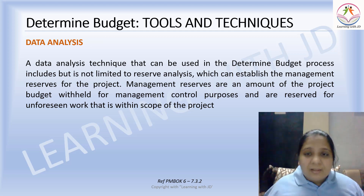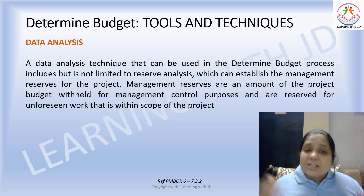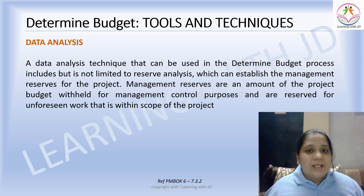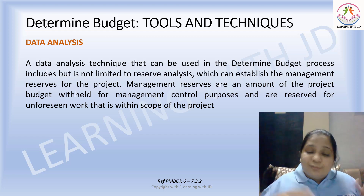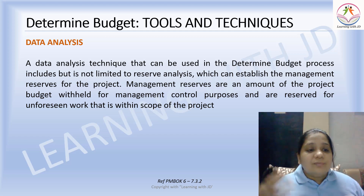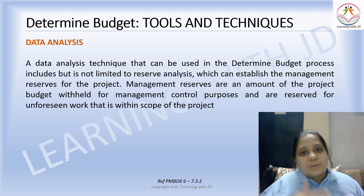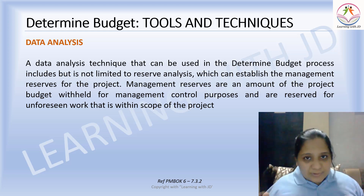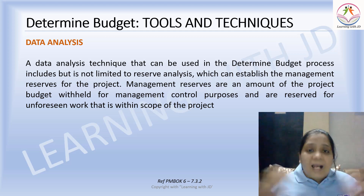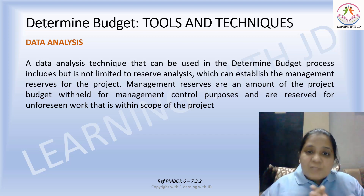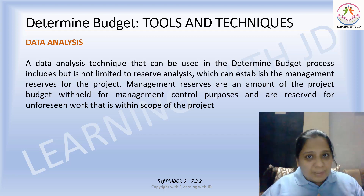Data analysis techniques include reserve analysis, which establishes management reserves for the project. There are two types of reserves: contingency reserves, which are used when a risk occurs, and management reserves, which are for management control purposes only. The project manager cannot use management reserves, and they are not part of the cost baseline.